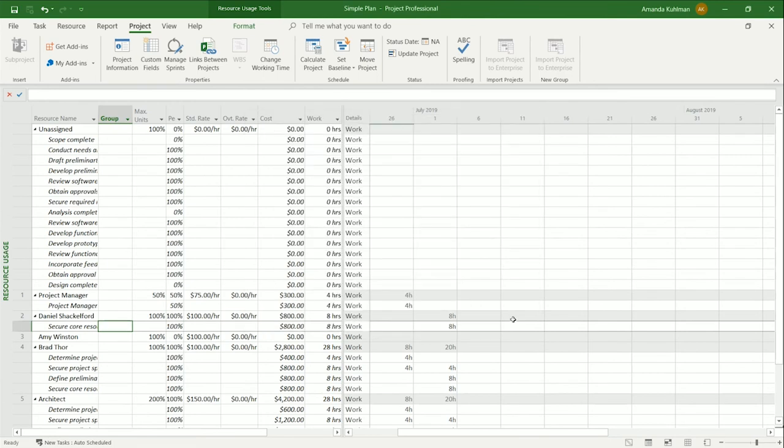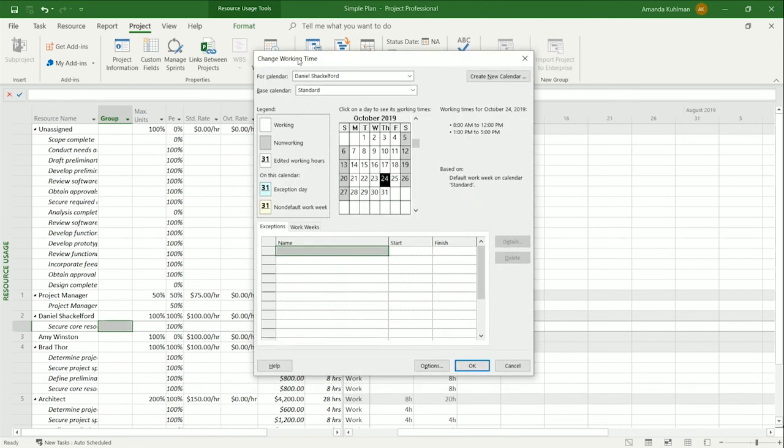We looked at setting our project calendar. What do we need to do if there are certain days that are holidays? Well, we would enter them right here in the exceptions. We would say we have a holiday and it's coming up. We're going to go ahead and make Halloween a holiday, schedule it right here. I have officially made Halloween a non-working day for my schedule. Any tasks scheduled on that day are going to skip right over it. So we looked at how to set that for your calendar, for your project as well.